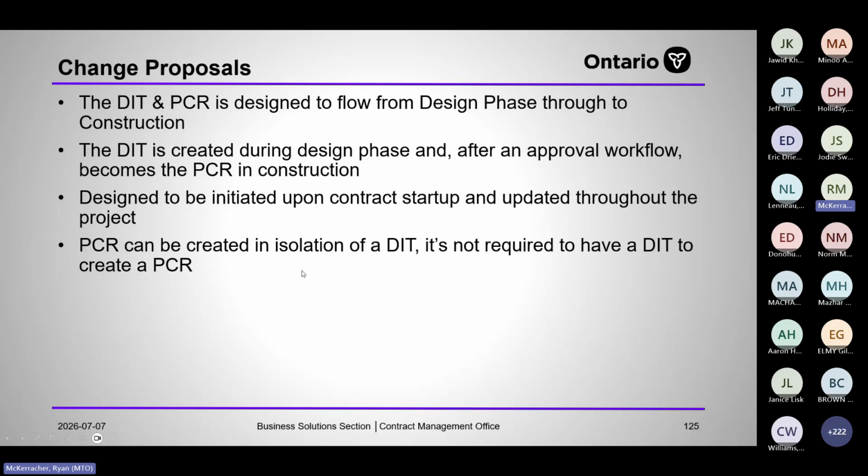So they record all the issues they have during the design phase of the project, issues that arise, assumptions that they've made, worries that they might have, concerns, whatever, you know, engineering things that they had to engineer themselves around. All get included in the DIT, then it goes through an approval workflow and then comes to construction.